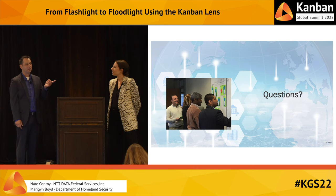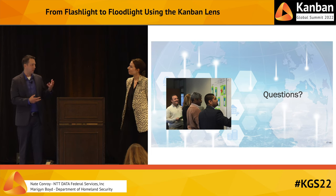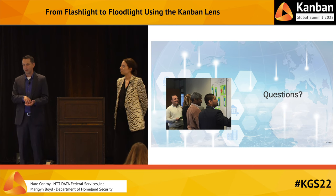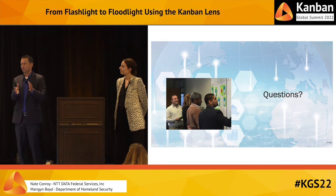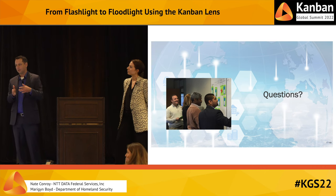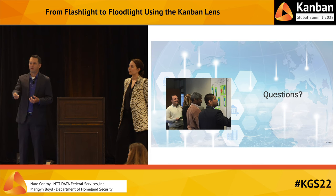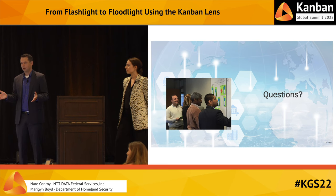Also we put a lot of work into creating customer views, customer portals, organizing all the work by customers, and Marigny mentioned just how hard it is even understanding who the customers are and naming them. And being able to visualize things that are in progress for customers, show them that work, and also say, well, here are the new things you've requested that we haven't accepted yet. Kanban does a really good job of making that distinction between a request being submitted and it actually being accepted. You don't think of that in your retail examples, because when you pay for a transaction, they accept it right away. But in an organization where the resources are so expensive, it's really important to have that distinction and not say yes to everything.